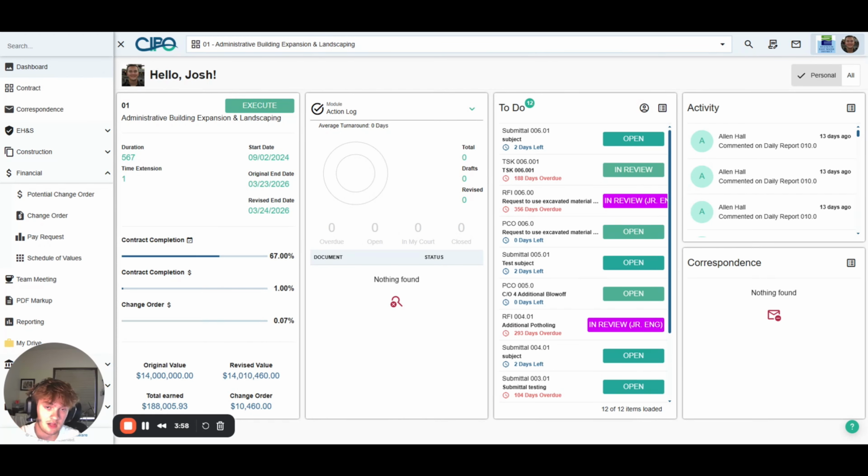First of all, it provides accuracy. These pay requests connect to the contract and its schedule of values, so the system will automatically know exactly what's being charged. Second, we have visibility. You'll see details like project name, contractor, CM, owner, and location, which are pulled right into a cover sheet or any template that your team wants to use or already uses. And finally, you have flexibility. These pay schedules can be set monthly, bi-weekly, or adjusted mid-period to match your funding source or project needs.